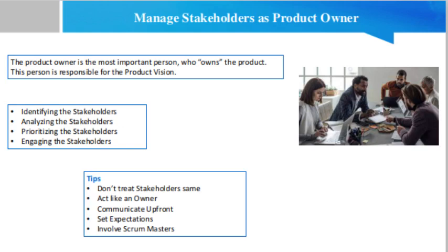High power, low interest. These stakeholders again have decision making abilities, but they are not so much interested. A lot of communication can make them disinterested in the project or product. They lack interest and therefore, they should be kept satisfied. So, do whatever it takes to keep them satisfied.